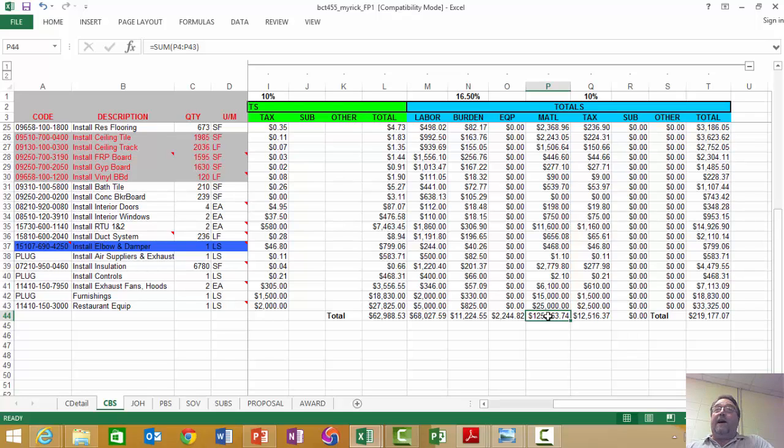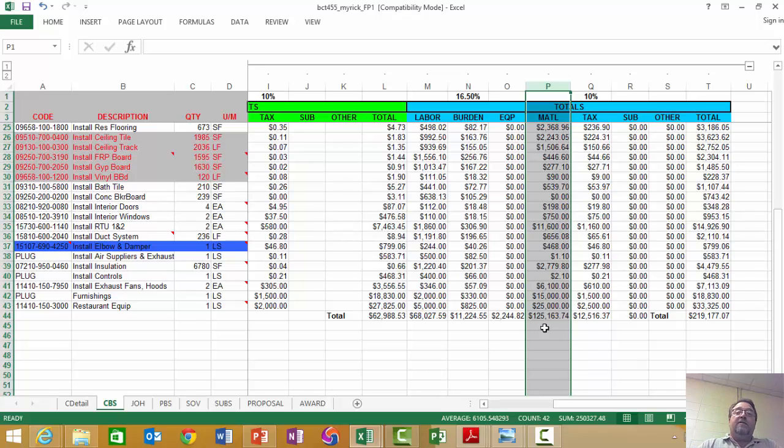All right, so if you have a high percentage labor cost category, you should get more return for your risk. So it should help you in how you're going to mark up the job. It could be that materials could be even more, depending on the type of job, more risky than the labor. Depends on where you're at.